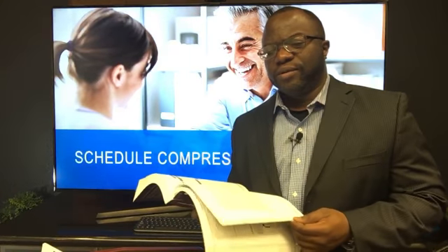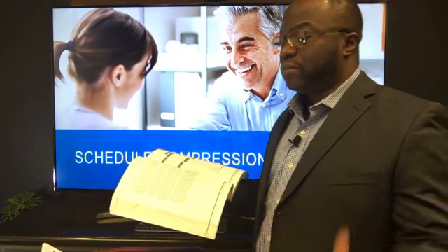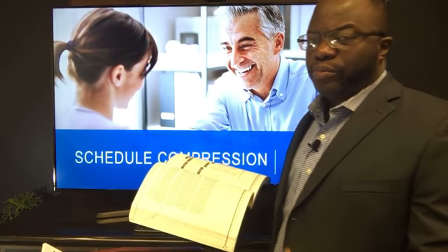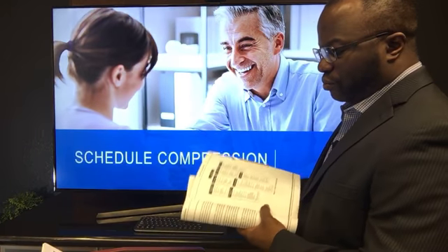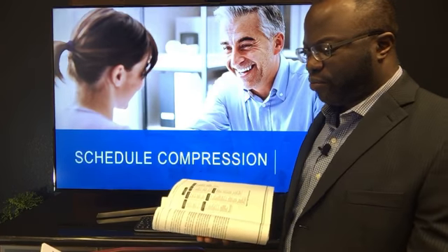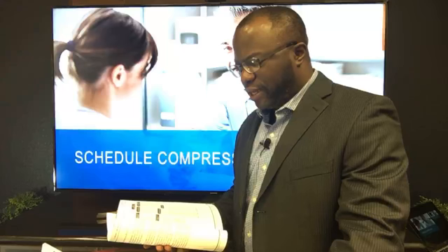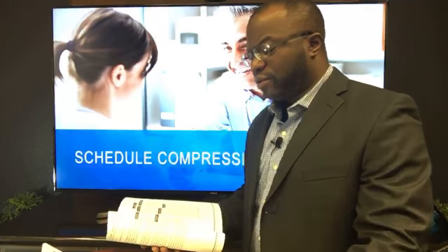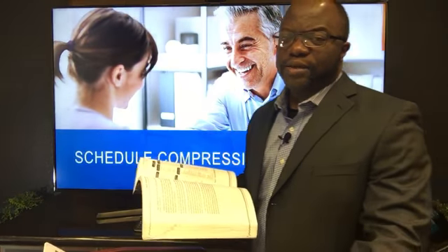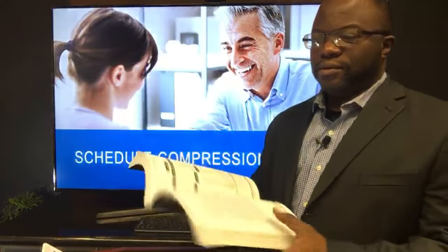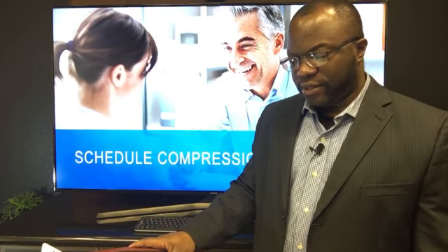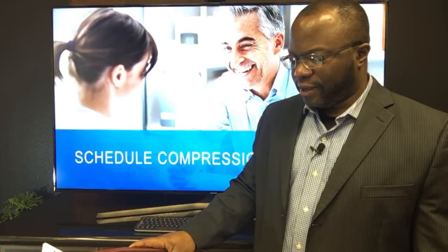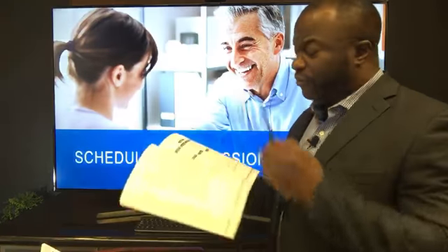Now, in which of these do we pay to expedite the delivery of, let's say, a sub-deliverable? You're on a project and you're paying to expedite the delivery of a sub-deliverable. Which schedule compression method is that? Paying to expedite the delivery of a sub-widget. Thank you, Carlos and Sachiguns and Amjad and everyone else who's typing in the answer. Very good. I know you guys are probably aware of the next question. Overtime is an example of what? Is overtime fast tracking? So you put several people on overtime so that they can carry out a task. What is that? Thank you for chatting in. Again, it's crashing. Awesome.